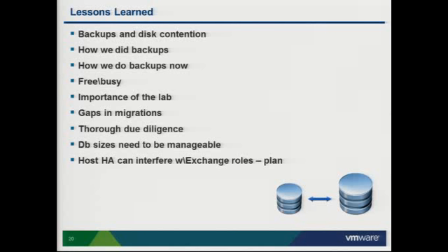So lessons learned. Let's start off with backups, because this is something that we didn't see in the lab. And this is where the lab is very important, but it's also very important for the lab to mimic production as best as possible. We decided initially to go with native Windows backup to back up our Exchange 2010 environment. Once you install Exchange, Windows backup is Exchange aware, and it'll back up your databases. In a DAG environment, however, it will only back up against your active databases. You cannot point it to a passive database and get a successful backup.